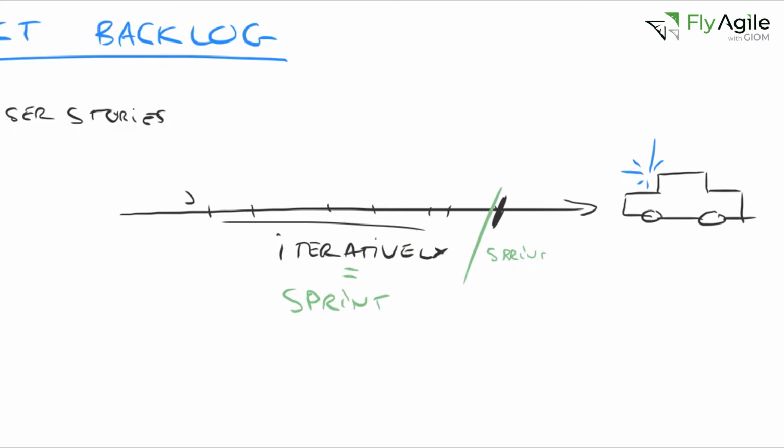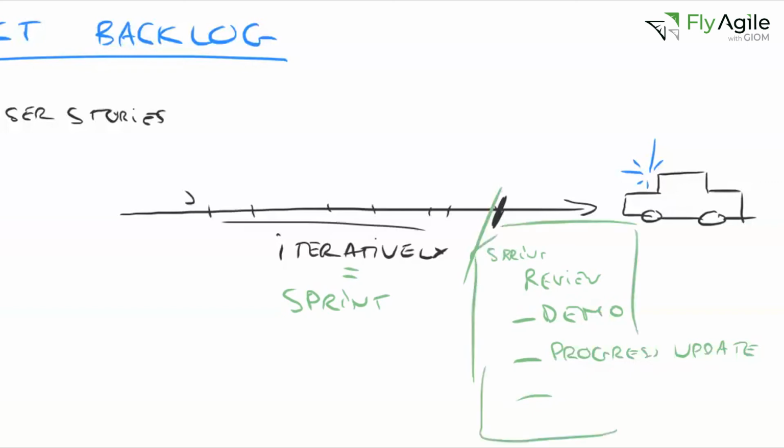So we work like this. At the end of this, we do a sprint review that's mostly composed of a demo, because we believe in actual product working. So we want to see it working and understand what it gives. And second, we update our indicators of progress so we have a sense of progression. Some people talk about story points, but that could also be code metrics, test coverage and stuff like this. It's always followed by the product owner's feedback to the team about the progress. The product owner is the captain of the product. That's the first ritual.